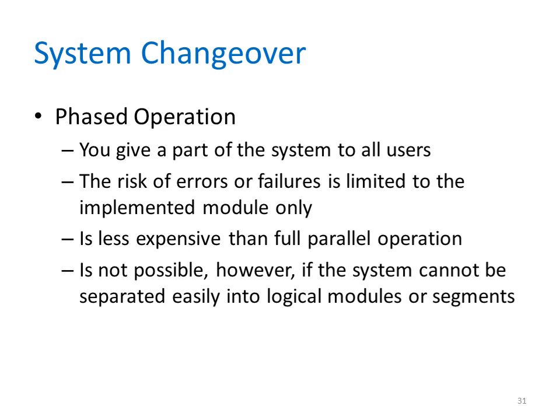The phased operation changeover method allows you to implement the new system in stages or modules. One advantage of a phased approach is that the risk of errors or failures is limited to the implemented module only. Phased operation is less expensive than full parallel operation because you have to work with only one part of the system at a time. A phased approach, however, is not possible if the system cannot be separated into logical modules and segments.